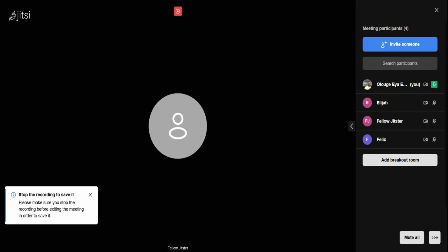For example, Michael Walkers is working on design. Meaning under the Gantt interface, when I double click on the tasks, that same pop-up window that opens, where you select the predecessors, on that same window, after the predecessor tab, on the right is the tab for resources.